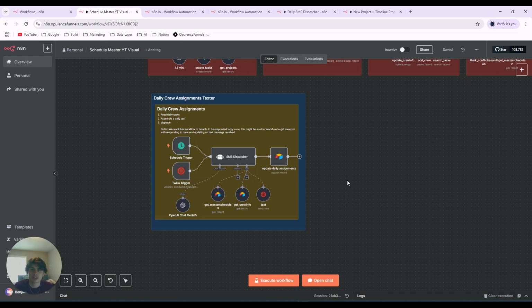And when I was working with the project manager, he told me that a big headache was when crew members finished up tasks early, it left holes in their schedule. And basically there wasn't a lot of optimization that he could do with these holes, because in order to do that, he had a physical calendar that he was just looking at and he'd actually go and make changes to. And in order for him to fill in these 1 to 2 day holes where he's losing a lot of time and efficiency, he would have to regenerate and redraft a lot of that schedule manually.